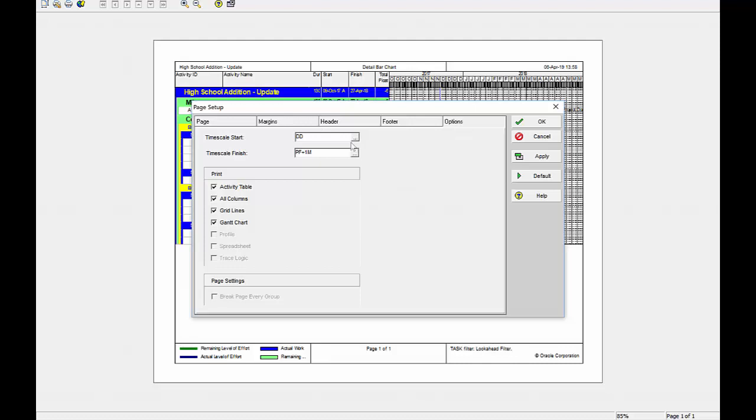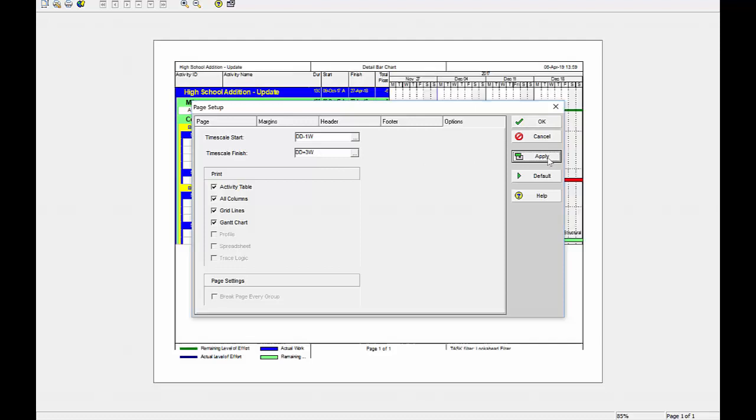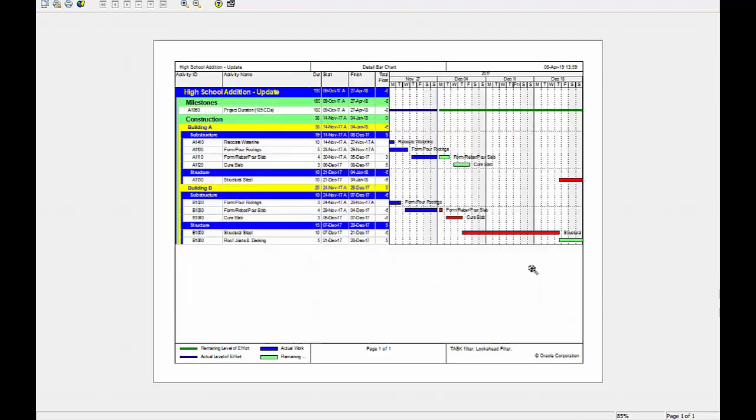I'm going to set this as the same as my three week look ahead. Data date minus one week to data date plus three weeks. I apply that. And now I have a nice three week look ahead schedule ready to print.